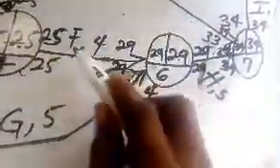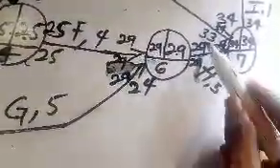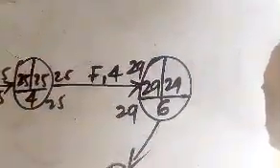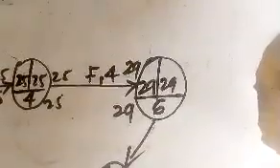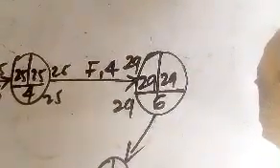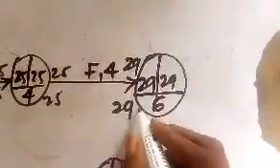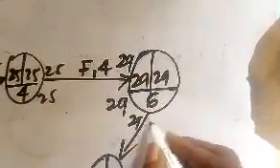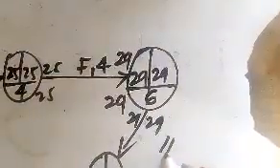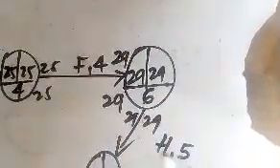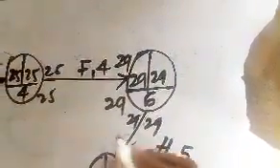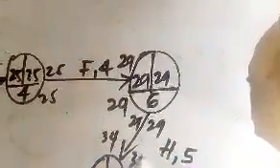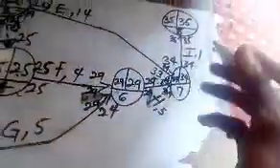After F, I have my activity as what, H, and that is 29. I have my I too, so I can draw my activity like that. I have this as my 6, and that is my 7, which is my H, and I have it as 29 here. For that, 29 will come out, and I have my H here with a duration of 5. There I have my 34. It's there in the diagram, you just need to draw it back.